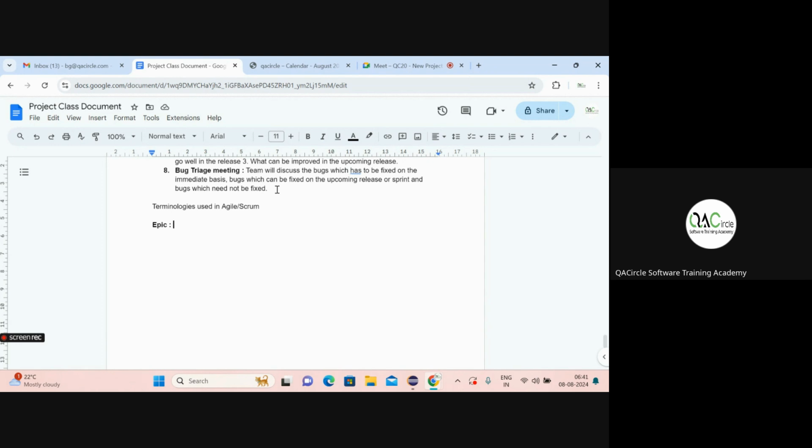There should be a referral option or a referral button that should be implemented. I'll make this one user story. The next user story is, once I click on that referral button, it should generate a referral code, and this should be a unique referral code for each and every user. I will make that the second story.